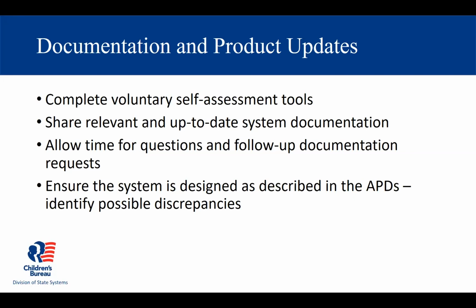Another important point is to take your APD and ensure that the system as designed is designed as described in the APD and identify possible discrepancies. Now, it's not unusual for plans to change. Folks know when they are submitting as needed and annual updates that they'll report on changes in plans. So it's not problematic that it's changed.